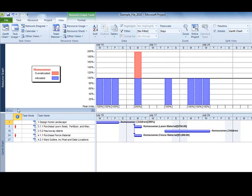With this split view, we can identify any time periods where a resource is over-allocated and quickly see the source of the problem. In this example, the homeowner is available 100%, or 8 hours per day, but on Monday, July 18, two tasks are assigned to the homeowner, creating an over-allocation problem.